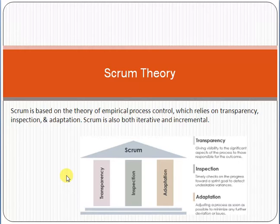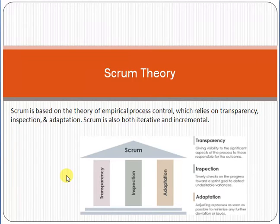Now, how does scrum come into the picture? Using the same e-commerce example with 40 tasks, here comes the concept of a sprint. A sprint is a three-to-four week time period. In sprint one, we take ten tasks and plan, develop, test, and deploy them. Sprint two takes the next ten tasks, sprint three the next ten, and sprint four the final ten — completing all 40 tasks across four sprints.